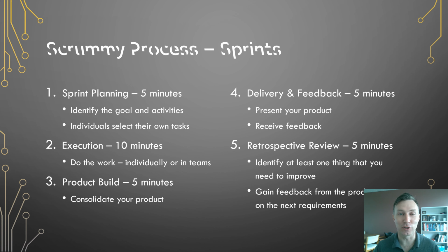These 5 steps describe one sprint. We'll repeat this process several times throughout a workshop. One sprint will take exactly 30 minutes. The first step is the sprint planning.